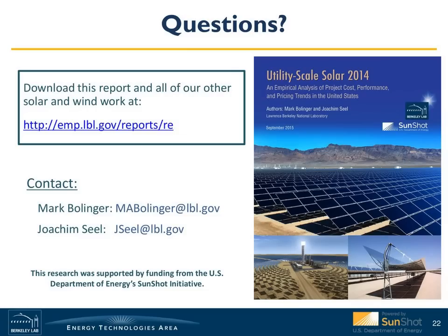And it is a little bit difficult to say that. In general, the publicly available GTM data had fairly broad categories. For example, they combined the inverters and the AC subsystem, and that is in our category here subsumed under inverters. And it was a little bit unclear to us to what extent they include insurance prices or other land costs, etc., in their category, which they call supply chain overhead and margin.